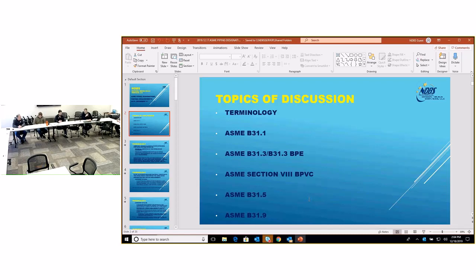Another thing you run into, Matt, and what we ran into on Rockwell, because I brought this up early, from when I worked at the chemical plant: the drawings and specs need to go to the insurance provider for their review as well. Usually it goes to the state fire marshal and the insurance provider, and you'll get five or six pages of comments back from the insurance provider. Now on the Rockwell job, Rockwell is taking the position that they will respectfully disagree with every single recommendation made by the insurance provider, which means their rates are going to go up.